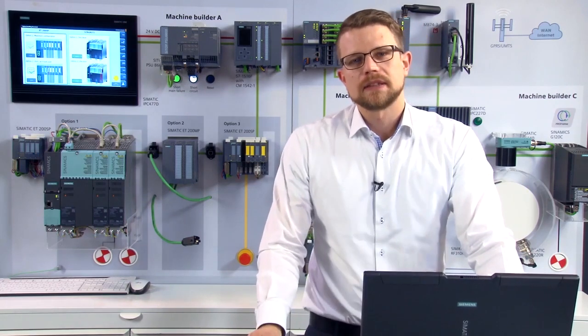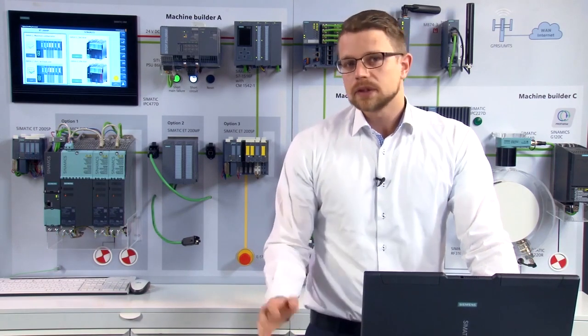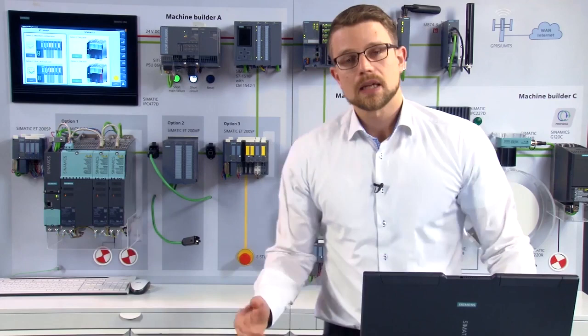Now that we've seen how we can optimize variation management, I'd like to show you another way to shorten the commissioning phase for the customer. Generally, you have to integrate your machine into a predefined address range at the customer's site. For you, this means that all IP addresses of all devices in the project have to be adapted accordingly. With PROFINET, you can assign a start address to the CPU and it will automatically overwrite the IP addresses of your devices within the project.